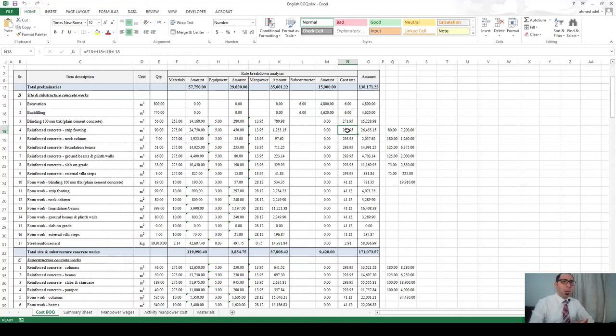And when we speak about cost, guys, there is more than one type of cost estimation or cost methodologies. Like there are conceptual cost estimation methodologies, and there is something called deterministic or definitive cost estimation. And what is the difference? Conceptual cost estimation is when you refer to some historical data in order to estimate a new project, but it is not accurate, guys. It is just something conceptual.